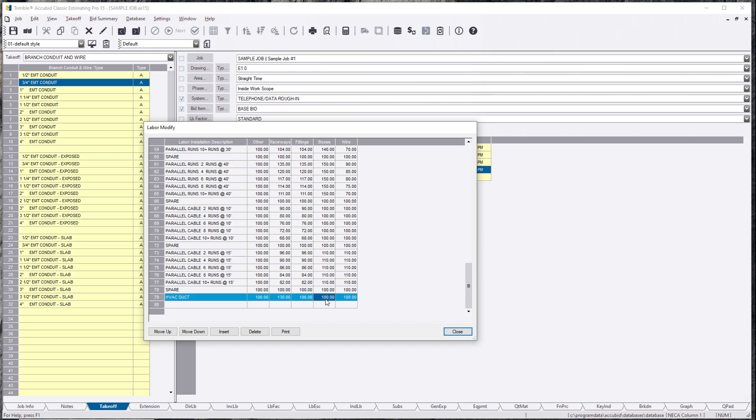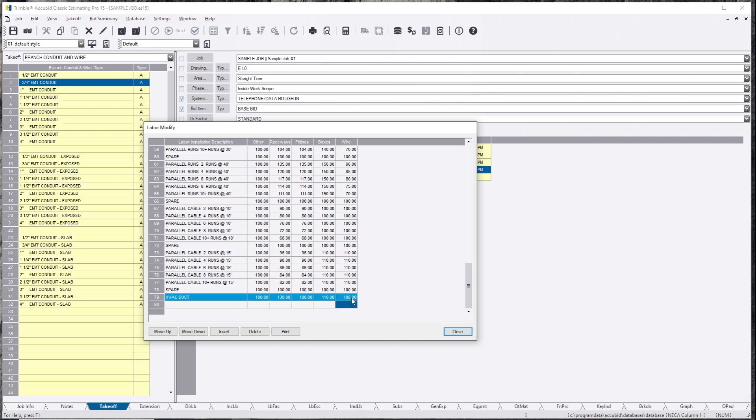Your fittings maybe not so much, but your boxes, yeah, might be a little bit more difficult, so you might want to throw 10 percent on there. And if you think your wire is going to take a little bit longer because you've got to add more and more boxes in between them because you're changing elevations or you're zigzagging around ductwork, yeah, you're going to have to pull multiple times from different locations, so we'll add like another 10 percent on that too.